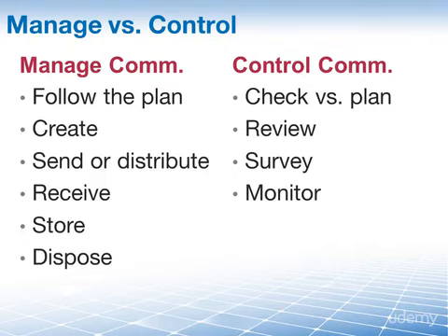For example, the communications management plan may say that hard copy documents with original signatures should be kept for up to 3 years after the project is completed, after which they can be disposed of in accordance with your company policy, which you know means that there is a company contracted to shred all your documents off-site. So you may use the terms manage communications and control communications quite loosely in your everyday conversations, but for the PMP exam you need to distinguish and understand the meaning of each of these in regards to terms